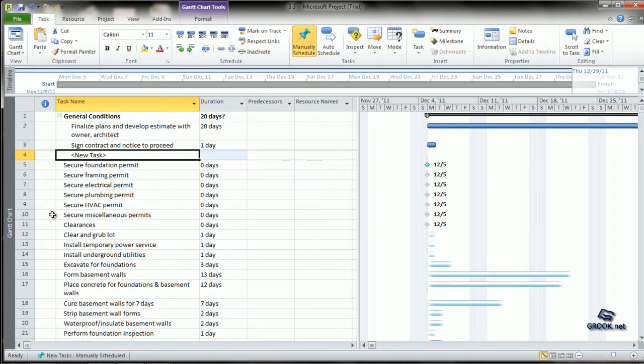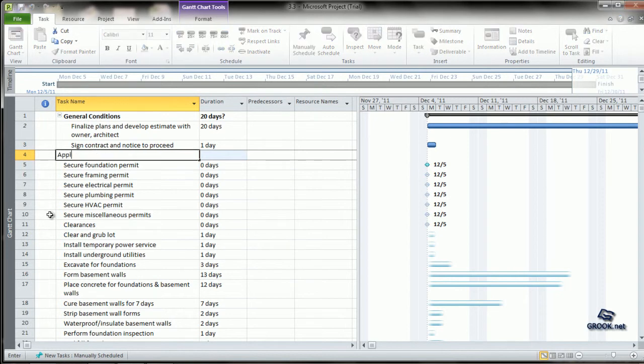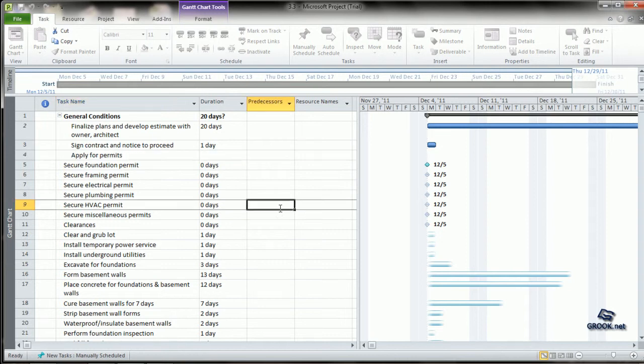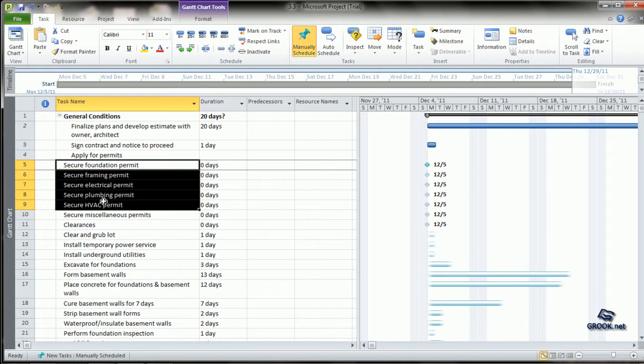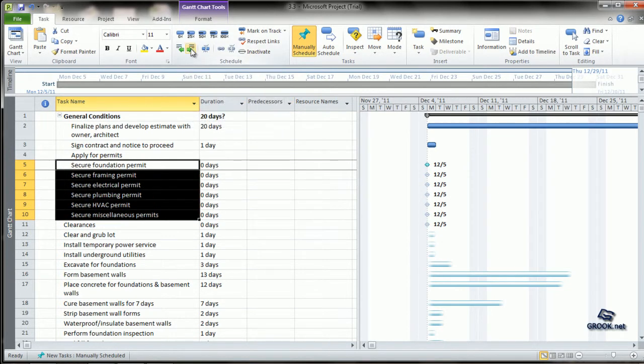We can call this as apply for permits. We can select all the tasks we want under apply for permits heading and we can indent it.